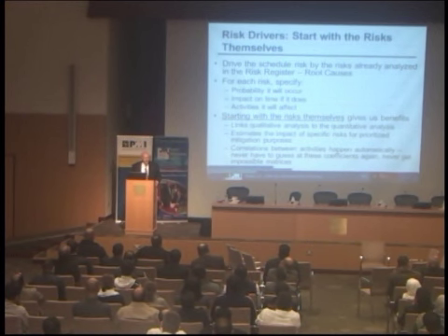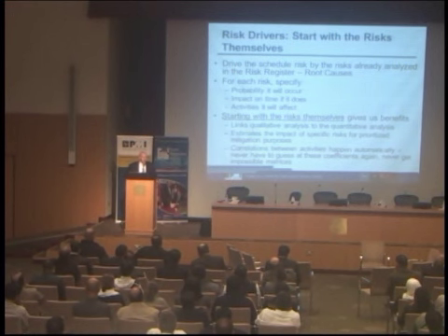We use multiplicative factors so we can assign the risk to many different activities of different lengths. And the multiplicative factors, while an assumption for convenience, is not a bad assumption. Okay, so we ask then, which activities will it affect?